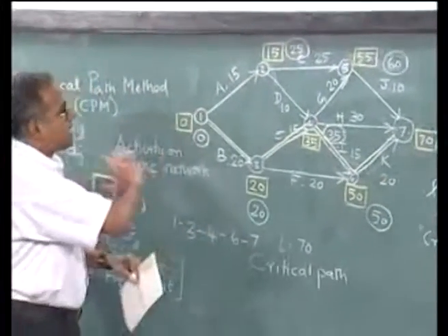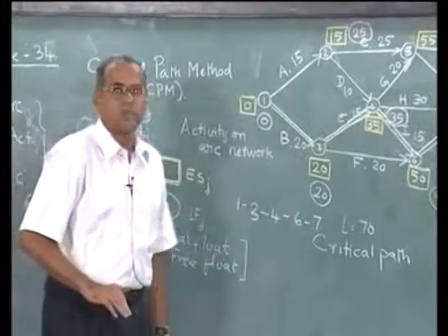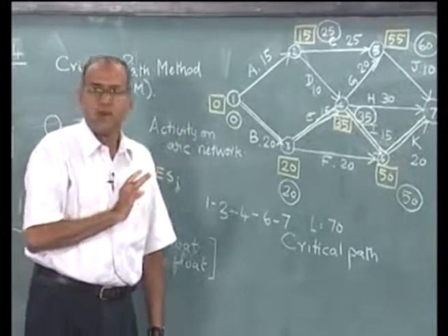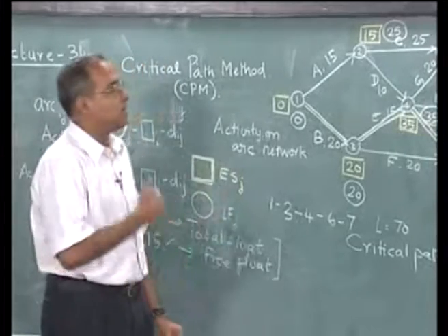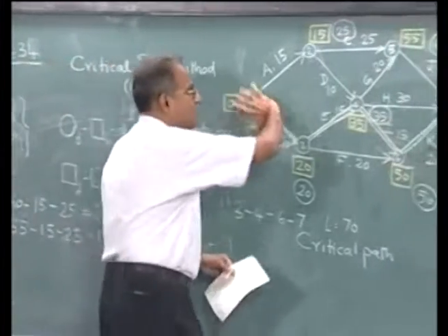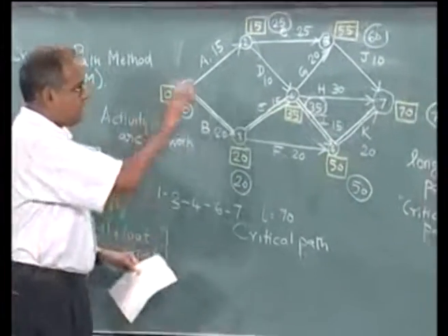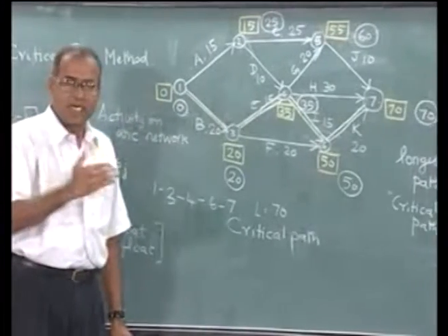The critical path problem can always be formulated as the longest path, and a simple forward pass and a backward pass of Dijkstra's algorithm suitably modified for the longest path would give optimal solutions under these circumstances. The circumstances are very important: the network is made up of arcs such that arcs go from i to j, j greater than i.